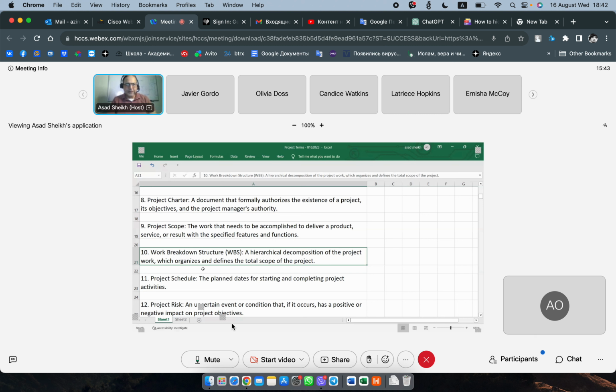All right, so this is a lot of PMP questions. If they have WBS as the answer, more than likely that is the answer. So this WBS is a very critical, very important component. Decomposition means break it down. If you have a big chunk of work, you got to break it down. The very bottom layer is the work package, the very bottom of that. So you may have a couple of levels. The very last one is the work package. Decomposition is a good word to keep in mind.